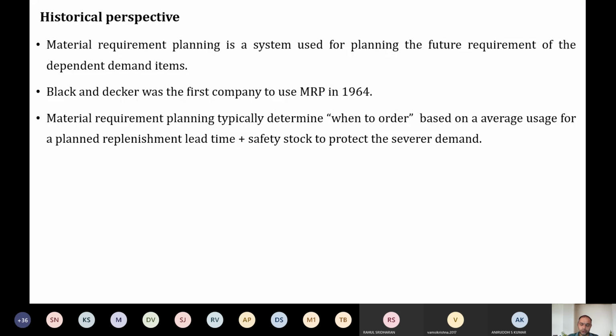So what you need to know is that you need to give the order to Apollo Tires at least 1 week or 2 weeks ahead, depending upon their manufacturing capability. You will be giving them an order to manufacture the product and supply it to you tomorrow. Tomorrow is Tuesday. So if you want to have your tires on Tuesday, and if the supplier will take 10 days to supply 50 tires, you have to order 10 days before now.